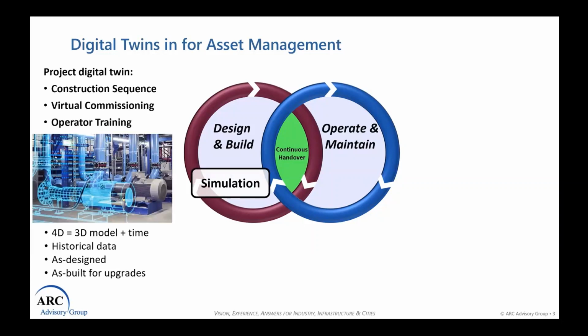In the case of design and build, we see digital twins that are typically a 4D model, meaning 3D plus time, and they are used to help out with the construction sequence, virtual commissioning, and operator training. And it involves the design and as built for upgrades.